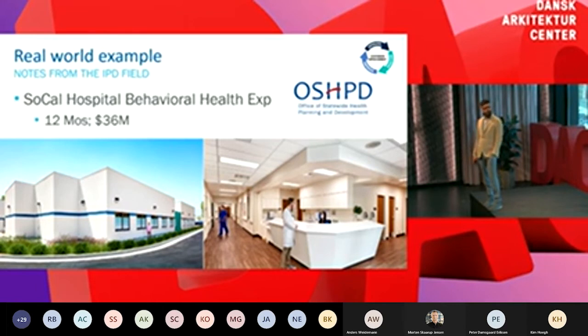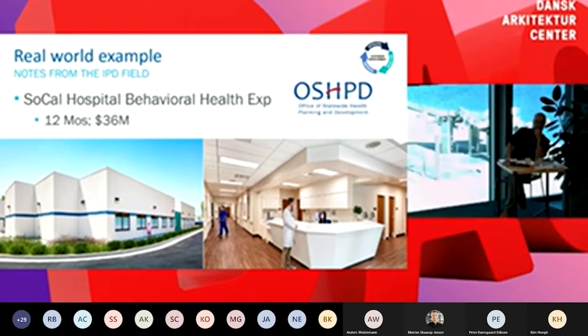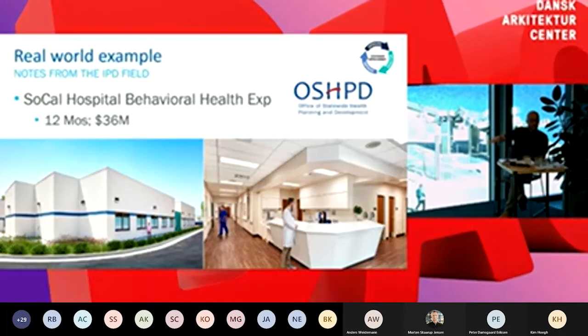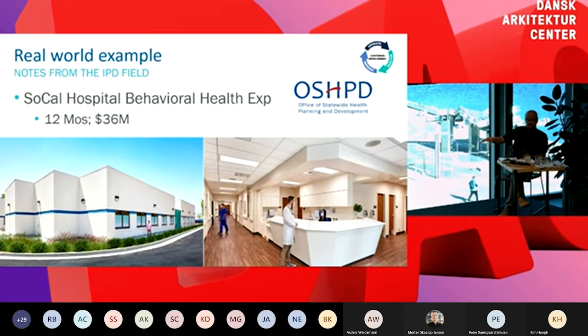Yeah, I actually want to provide a little more insight even. This was before prefab was the thing to do in the lean world. It was a concept, but especially with our jurisdiction, which requires basically eyes on everything, we didn't understand how to accomplish it. So our first attempt was we created this giant tent on the side of our project, right? Yep. And we were avoiding the owls. Yes, avoiding the owls. And we prefabricated a lot of the components on site. It worked because since we were on site, the inspectors didn't have to go afar. And then as they gained our trust, we were able to move our prefab operations off-site. And then we worked it out that they would come inspect at certain intervals, right?